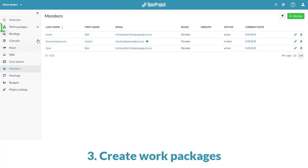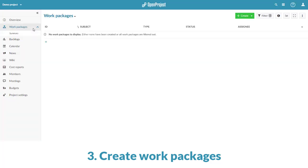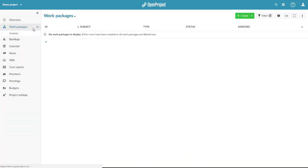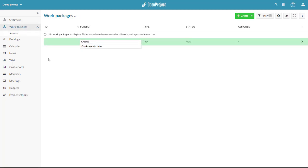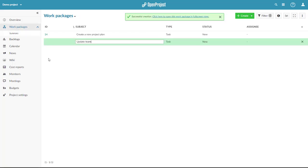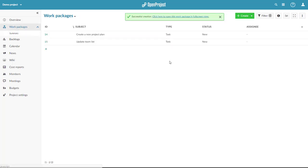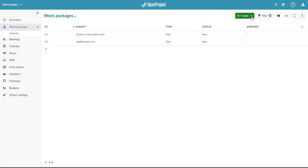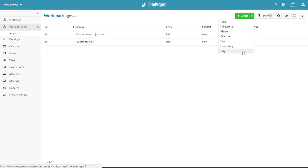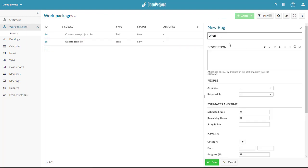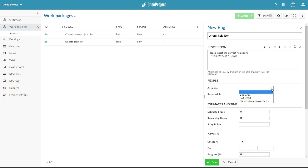Third step, add your work to the project. This can be anything you want to track, for example tasks, features, bugs. You can create new work packages directly from the list. Or you can choose Create and select the type of work you want to add. Enter title and description, add files per drag and drop or copy paste and assign it to a project member.